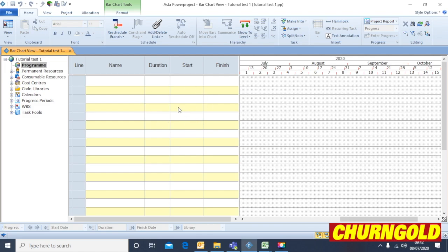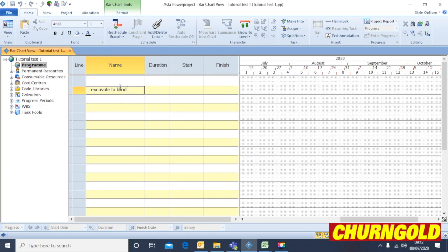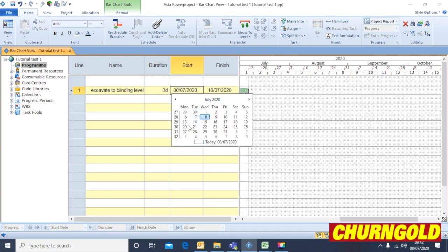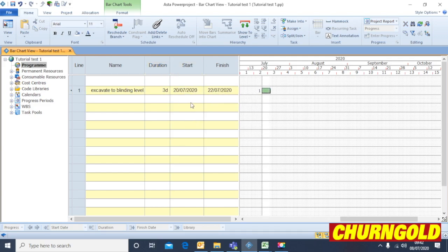For the sake of this exercise, I'm going to copy and paste some text in here. But ordinarily, you would just go through writing as you would Excavate. So you put the title of the task in there, you put the duration, and you can put a start date, let's say it's 25th of July, and then you can keep going.